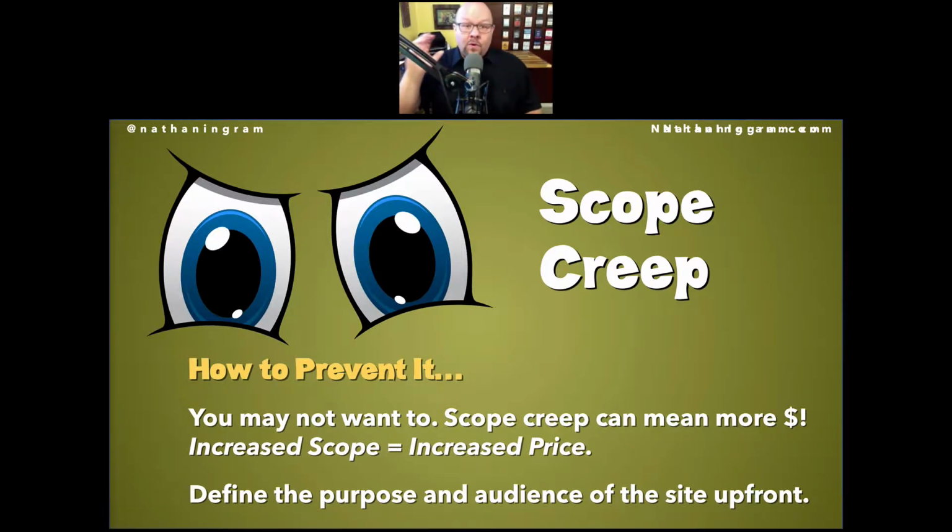What the site contains and what they've hired you to do should be bullet points in the scope of work in the proposal, with the price that they agreed to. So if the client wants to add something to the scope of work, fine, that's wonderful. It's going to make you more money. But if they want it for the same price, well, that's just unreasonable. No business can operate that way.